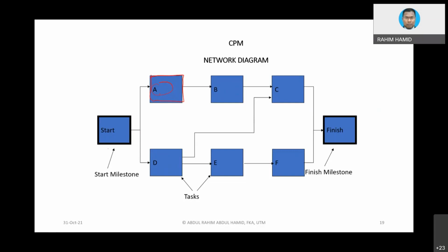You can add start and finish activities, what we call the milestone diagram, in order to make the diagram closed. In an arrow diagram, yes, normally we have a very closed kind of network. But in CPM, AON or PDM diagrams, you are allowed to leave it without them.